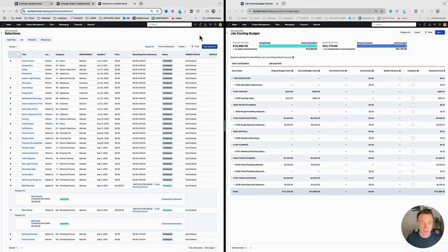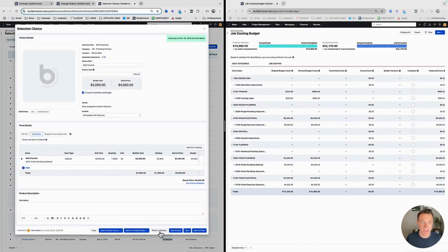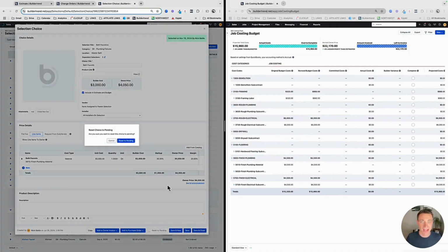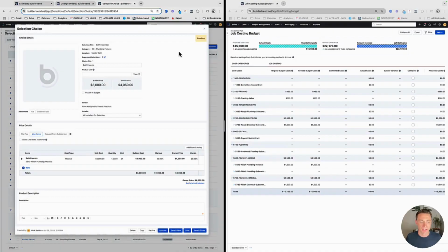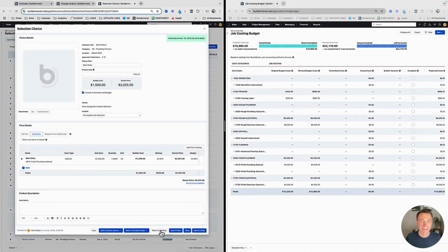Okay, you want to set them before you start making selections and lock that budget so that you can see original versus revised. If you don't do that, then your original budget's going to crank up. It's really just going to continue to increase that, okay, as you go.